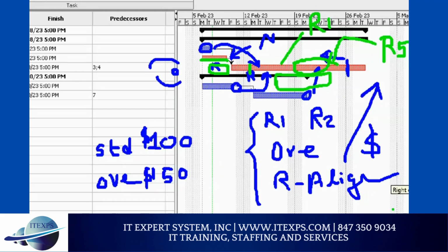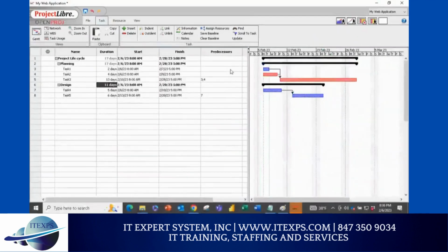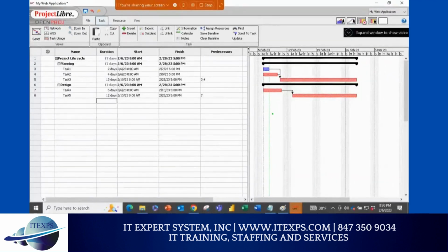Because you can be doing so many projects at the same time. Yes, not only that, but you can be doing different tasks at the same time. So if I do 11 here, let me do 13, maybe 12, you can see I have two critical paths in front of you. So can a project have multiple critical paths? Answer: yes. You can see that because this one creates 17 and this one also creates 17. So it's a critical path. Now the question: when you have multiple critical paths, does the project become risky or does the project become simpler?